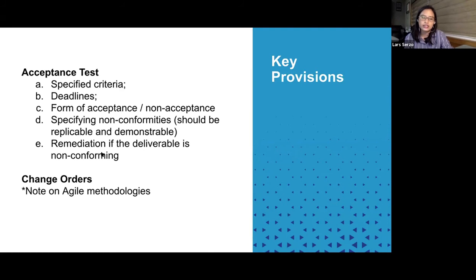So this is important in terms of preventing scope creep, where your project ends up covering certain aspects that none of you intended, thus leading to either over budgeting or missing deadlines and missing set timelines. So the change order should enable the provider, if you're the provider, to adjust the cost and adjust deadlines, and thus prevent possible events of breach.